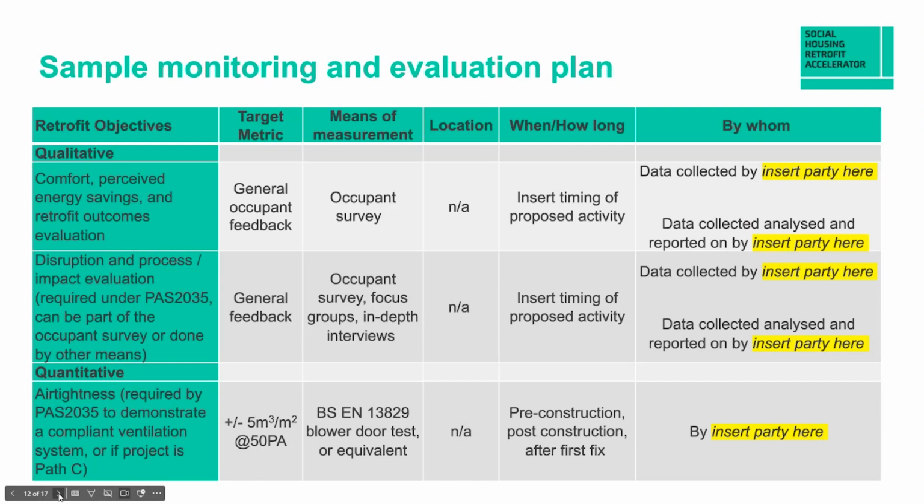So this is something you could do from a general occupant feedback survey. And you could ask them things about, does their house feel warmer than it used to be? Do they feel more comfort? Are there areas of the house that feel warmer or colder than before? You could ask them to tell you if they feel like they've saved money, and obviously ask them whether they are happy with the outcome. Alongside that, you could actually have a look at fuel bills and measure their fuel bills if you can get access to them, and that would enable you to tell whether they've had a reduction in their energy use, or it stayed the same, or possibly even increased.